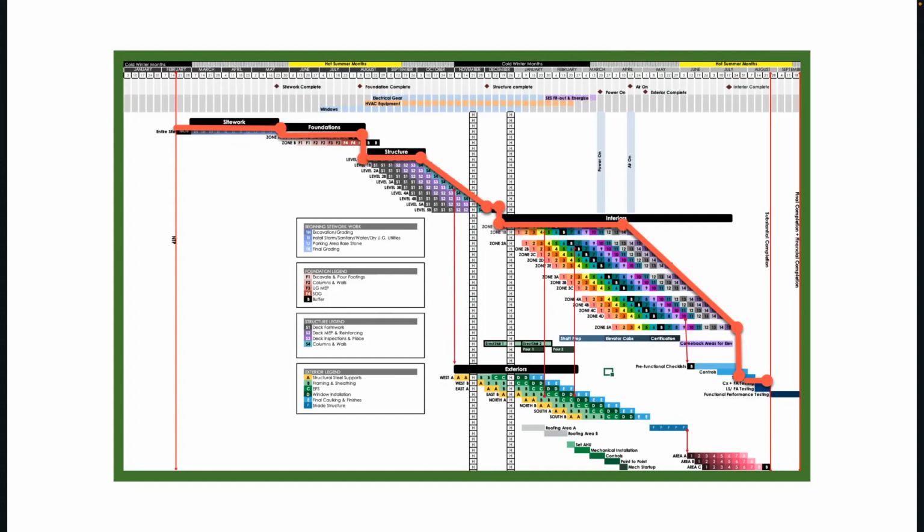And so this is based on critical chain theory, which has been shown to be over 40% more effective than the critical path method. And what it is, it's a system, obviously in the Takt production system, where we link together these phases, but we do it with some very specific details. So every phase has a sequence. This sequence can be verified and validated with production rates and with the sequence of work and through pull planning.